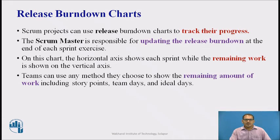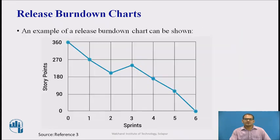The remaining amount of work can include story points, team days, and ideal days. In this example, the chart shows that the team started with 360 story points to successfully complete their project in a planned 6 sprints. For example, the team would have to average 60 story points for each sprint.